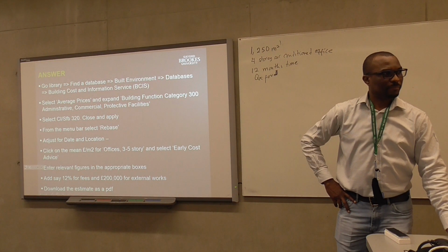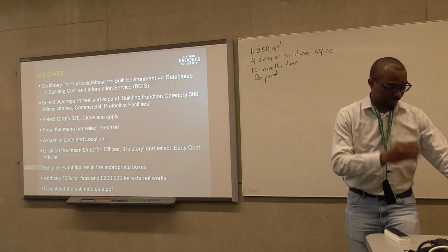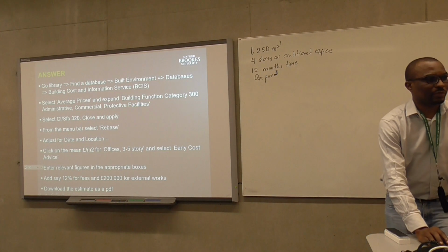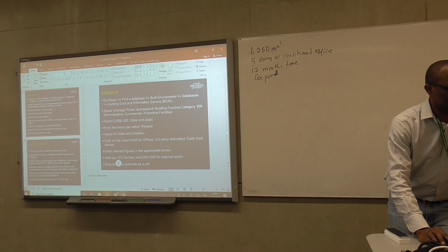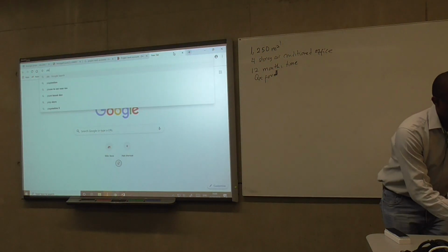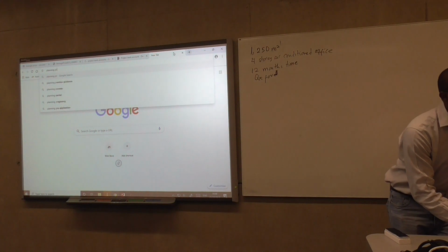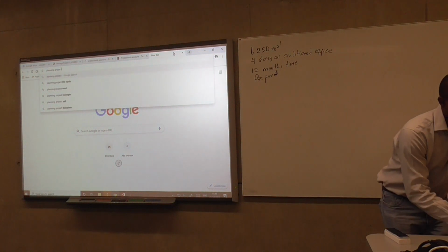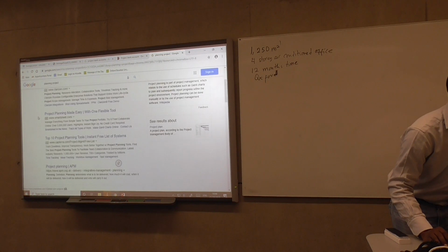I was more into, if this was a question that was brought up in the intensive study period, a bricklayer, how many bricks do you put in a day? I know, because I've done something, 600 bricks is the industry average. A plumber, how many meters of pipe? Yeah, there's another website that does that as well, in terms of your output averages. If you go to planning, go.